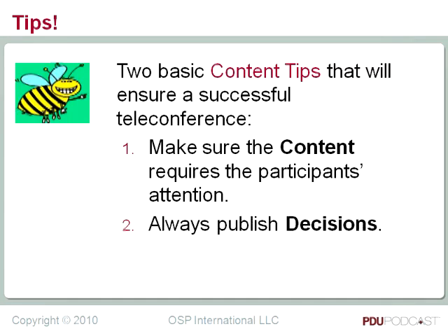And then second, always publish the decisions. This is, once again, my famous no-brainer, but it's very important that any decisions that are made are published, because if you don't do that, then later on there can be some discussion, let's call it, as to whether or not I was assigned that and that was my deliverable. I didn't understand that. Maybe I didn't get that was what you were assigning to me. Once it's published, everybody knows, and in fact, if a mistake is made, then you can be alerted to that and you can correct it. So always publish your decisions.